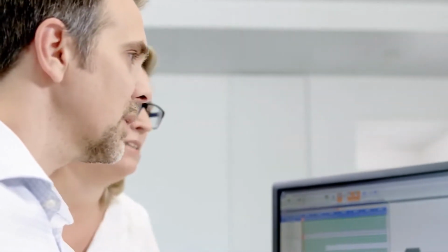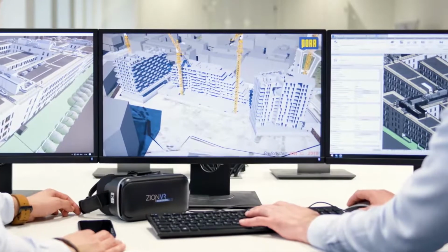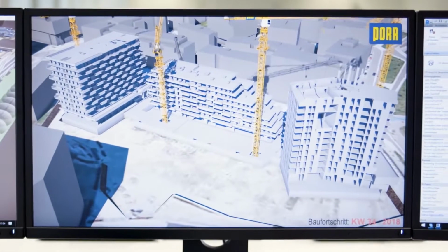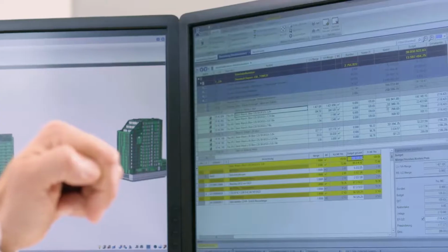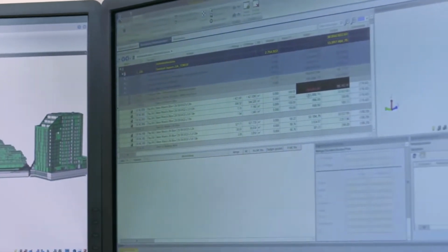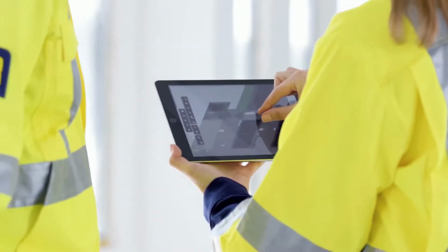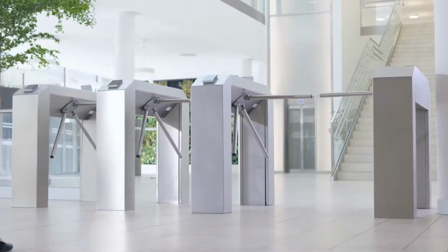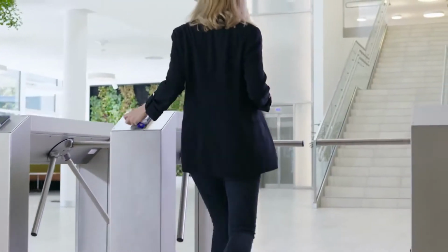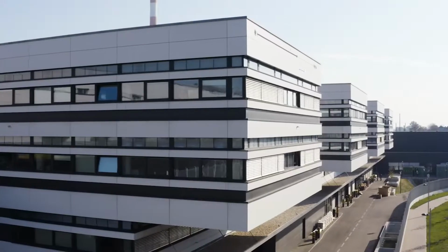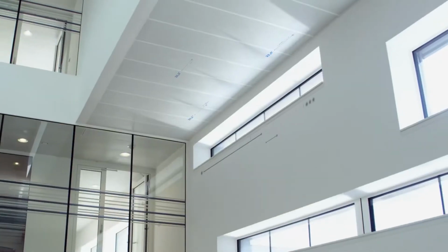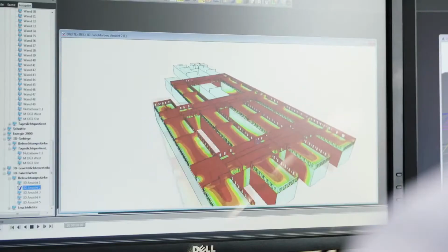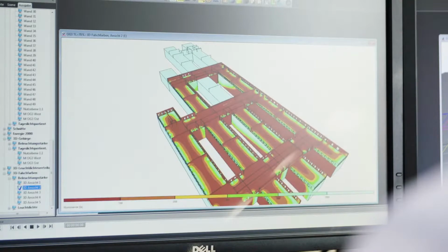This includes comparison of planned versus actual schedules, time-based clashes, such as verifying the planned sequence towards constrained activities, like demolition, permanent construction, and temporary construction, site utilization planning, and more. A 4D model can be used at all stages of the project.